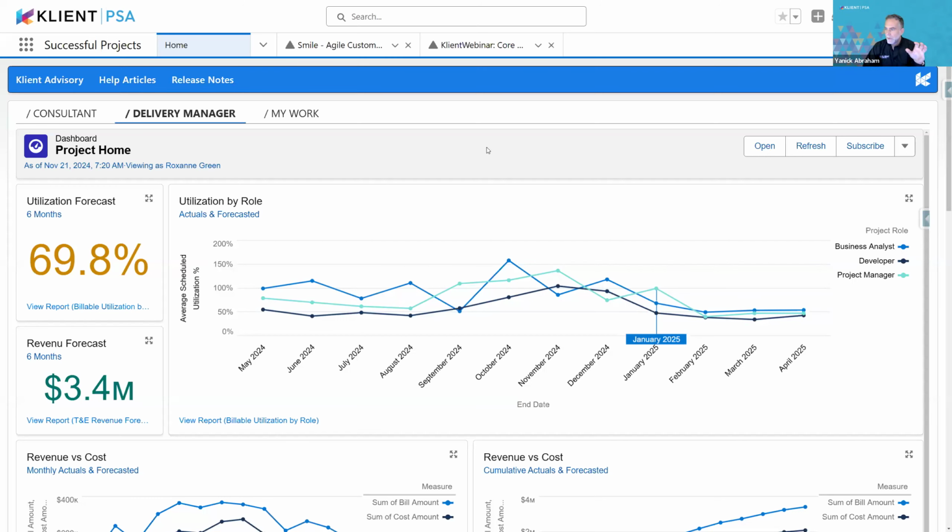One thing that people sometimes forget is that when you have a new customer, you can automatically create a support project. Every time your customers reach out to your support team, you can log the hours. So you're going to measure the real, true costs of your customer, including support. That's one of the reasons that having that component drop on the case object makes the experience a lot easier for your team to log their time.